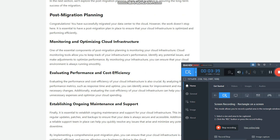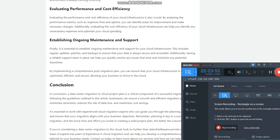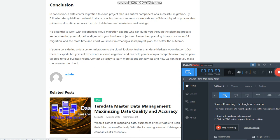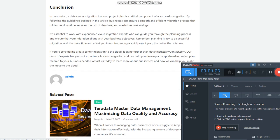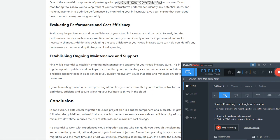Determining cloud provider and migration strategy: Once you've assessed your current infrastructure and identified your business objectives, the next step is to determine the best cloud provider and migration strategy for your needs. This involves evaluating different cloud providers and their service offerings, as well as selecting a migration strategy that aligns with your business goals. Some common migration strategies include the 'lift and shift' approach, which involves moving your existing infrastructure to the cloud as-is, and the 're-architecting' approach, which involves optimizing your infrastructure for the cloud. By conducting pre-migration planning and following these steps, businesses can ensure a successful data center migration to the cloud.